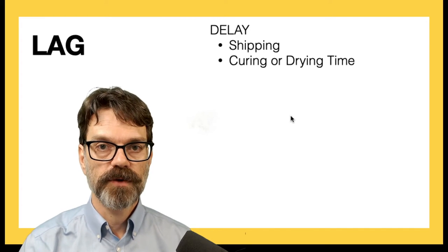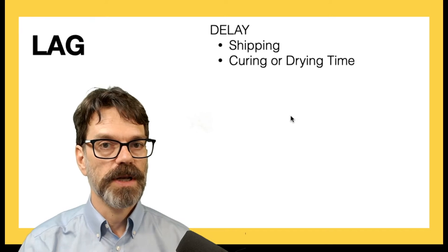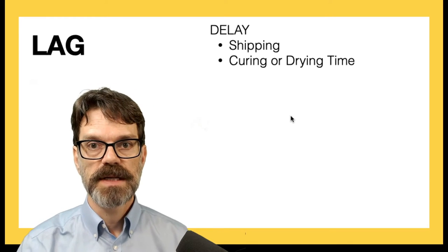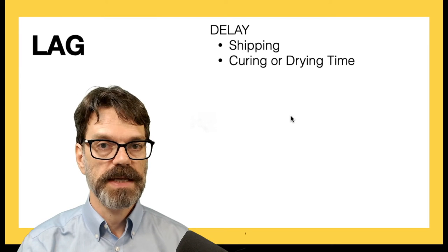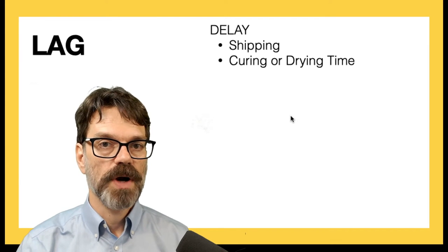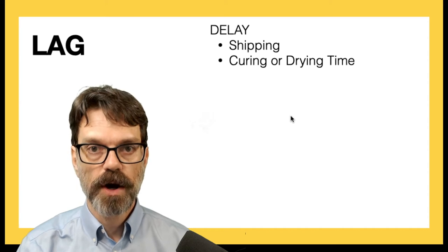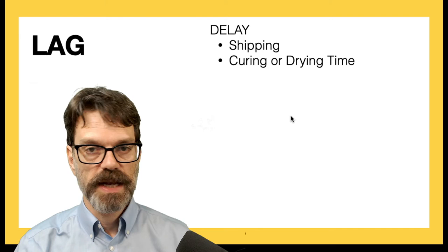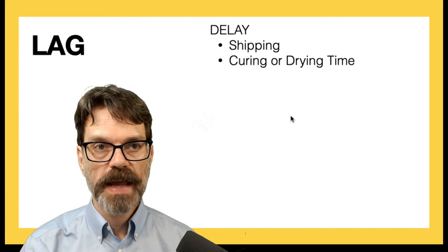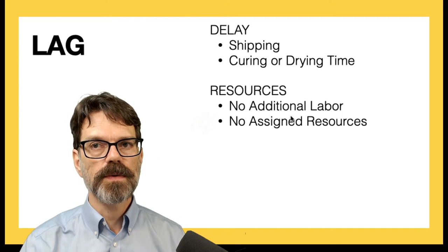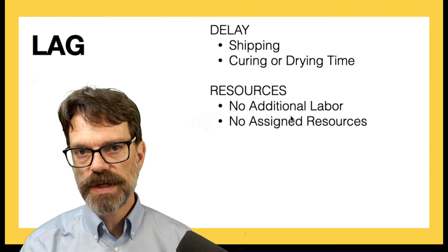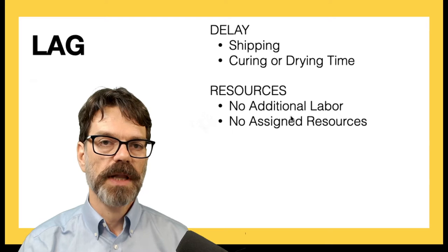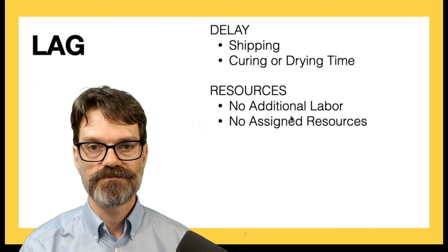So you think about concrete being poured, you can't start putting up walls on that concrete until it has a little time to dry. Same sort of thing with different cements. They may take some time to dry, like thinking about putting down carpet or something like that. Or we might have other things that have to dry, for example, drywall or paint. So lag uses no resources. That's one thing to consider here. There's no additional labor that's assigned to lag.